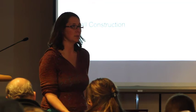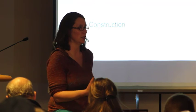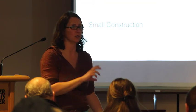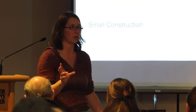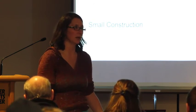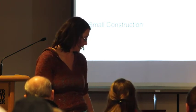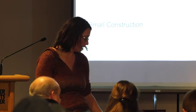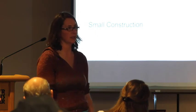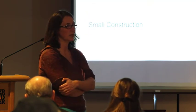If the site is inaccessible for some reason, you would note that in your inspection documentation, and you need to be specific about why you couldn't reach there. It was so muddy we couldn't get on site to do our inspection, so we had to wait until February to do it instead of doing one in January. Otherwise, it's 30 days. If you can access that site, it's 30 days, unless it's inaccessible. There are some places that are inaccessible 6 months out of the year, and you would note that, and we understand that.